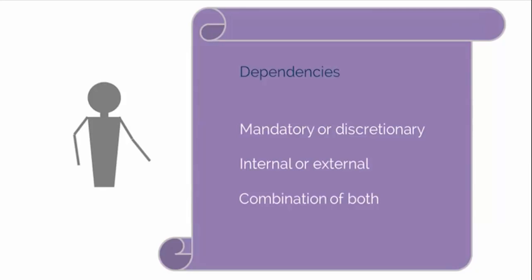Discretionary dependencies, often referred to as preferred logic, preferential logic, or soft logic, are typically due to industry best practices or a desired sequence. For example, you decide that it is best to make door and window frames before the full structure of the wall is in place.